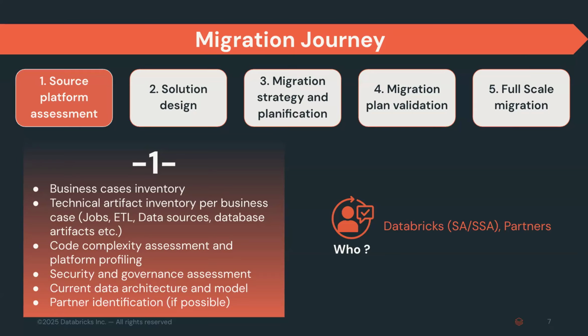Just as I mentioned, the arithmetical exercise in terms of outlining the business case, inventory, right? Outlining, okay, what it could be with regards to efforts approximation, the TCO. There would be source platform assessment. Super, super important there is that we try to have the first vision in terms of what we are trying to achieve from a business perspective, what could be the target architecture, what can be the approach, or at least at a high level talk about these particular gaps.